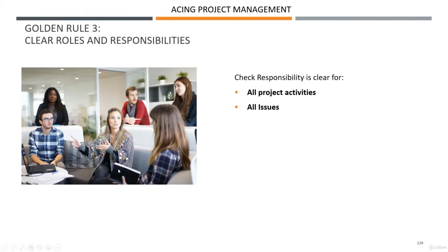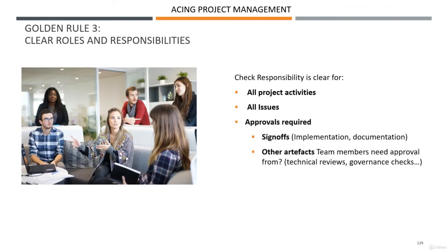To finish, also approvals. You could be working on a project, about to implement, about to reach a milestone, and when you look for sign-offs, everybody looks the other way. So it's really important, and we had that in a project charter or the PMP, the sign-off list if you can, because otherwise it's going to be extremely difficult, and you could waste time because someone is going to be brought in last minute as a sign-off, and guess what? They'll be reviewing all the documentation. And the chances increase that they're not going to be happy with it, so you might have to take a step back.